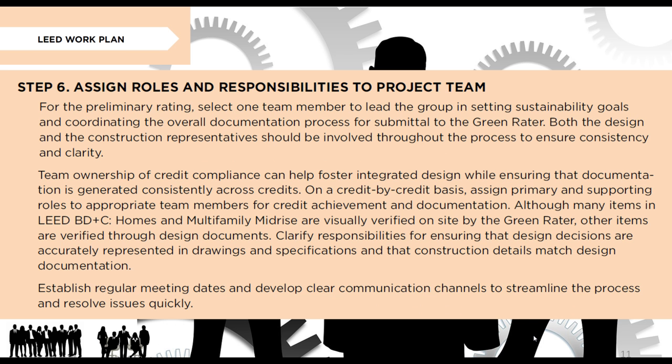Step 6. Assign roles and responsibilities to the project team. For the preliminary rating, select one team member to lead the group in setting sustainability goals and coordinating the overall documentation process for submittal to the Green Rater. Both the design and the construction representatives should be involved throughout the process to ensure consistency and clarity. Team ownership of credit compliance can help foster integrated design while ensuring that documentation is generated consistently across credits.